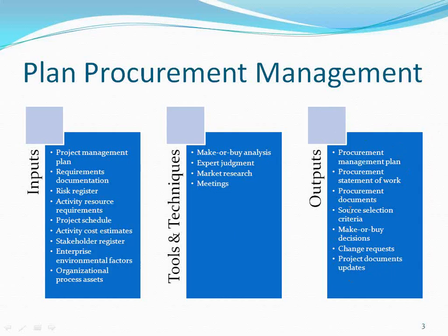So you should know whether you need any permissions to use the Mona Lisa painting or not. Is there an intellectual property right dealing with that? If that is the case, then you have to purchase this intellectual property right, copyright, from whoever owns this particular painting. So requirements documentation will help in knowing that.